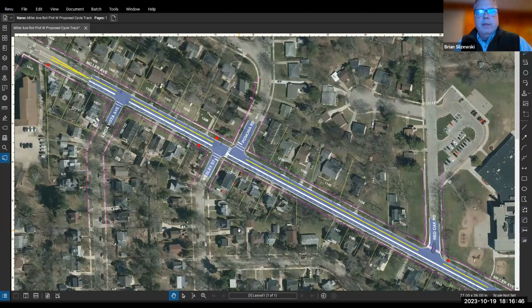So those are kind of the primary things on that phase one project, where we're going really from Newport to Chapin. We've got water main that needs to be installed, replacing the old water main, some stormwater improvements, providing the room to get through with a bike facility at 7th, and providing improved pedestrian access in the area of Ann Arbor Open School.